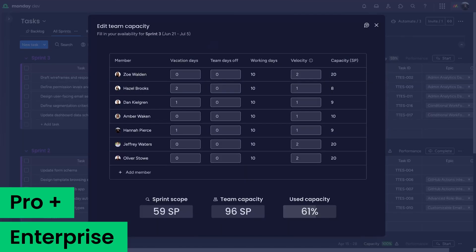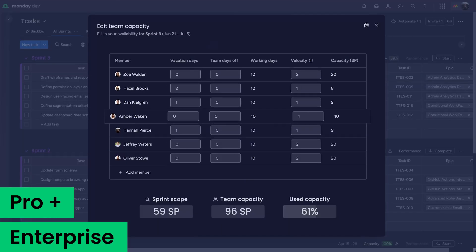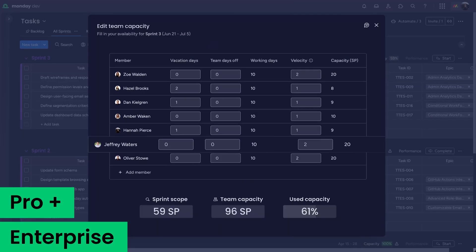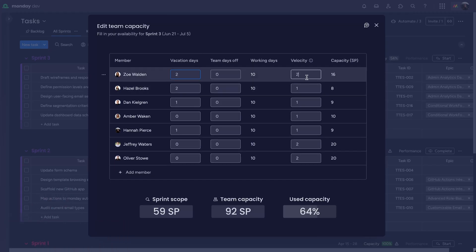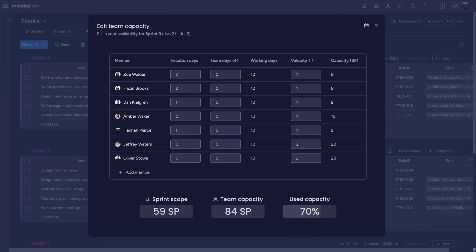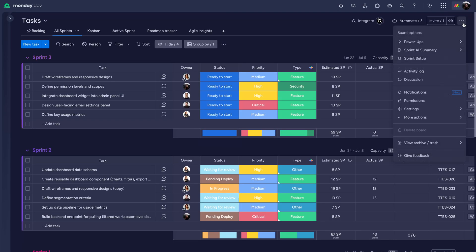It factors in each team member's workload and available capacity before the sprint even begins. Adjust for vacation days, shift velocity, and see the impact in real time. Finally, define a schedule for your sprints to start and end.